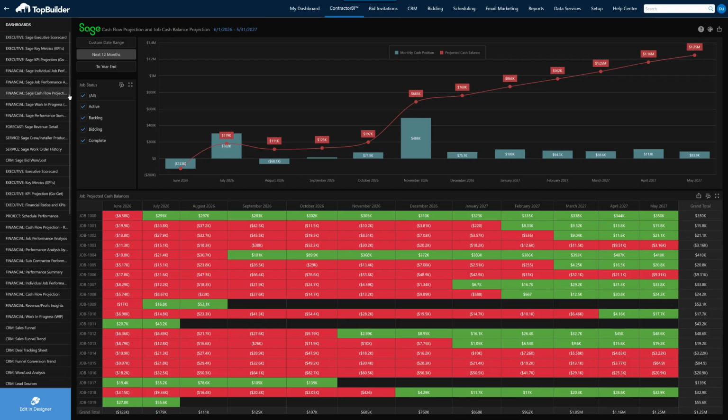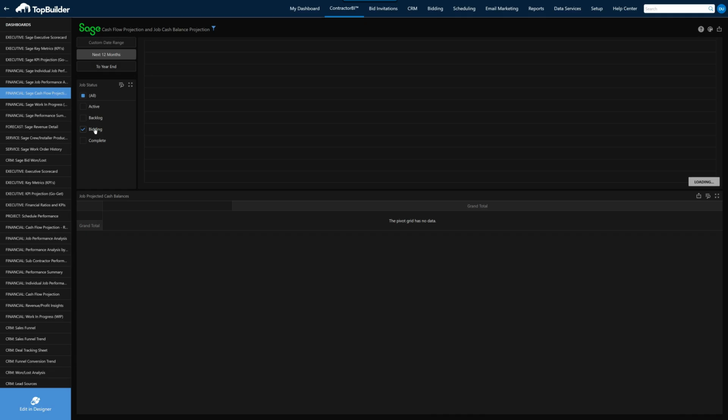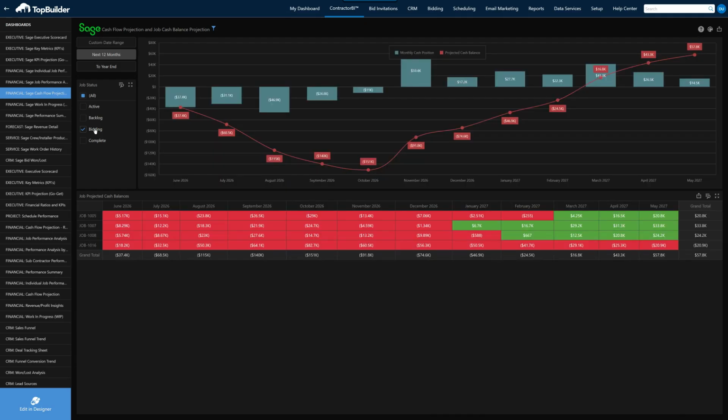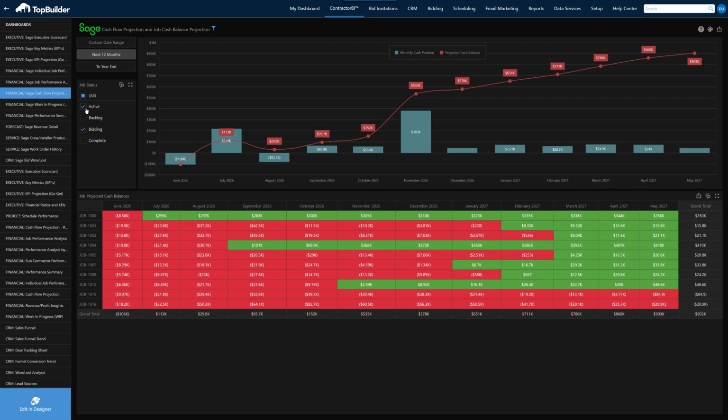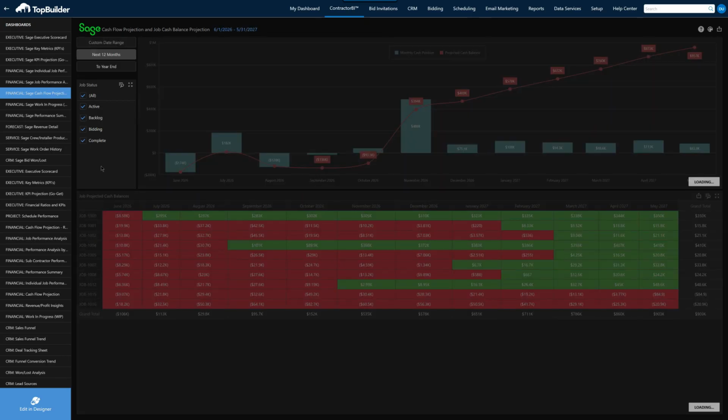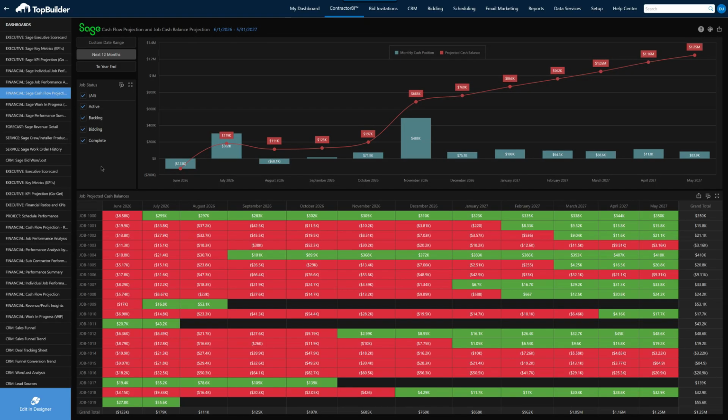But also, when you're looking at cash flow, you need to make it realistic. What I mean by that is you need to make sure that you're looking at typical payment history of your customers and not just the invoice balances and due dates, because that's not always realistic. So you want to get a more realistic cash flow from all that data we're getting out of Sage.